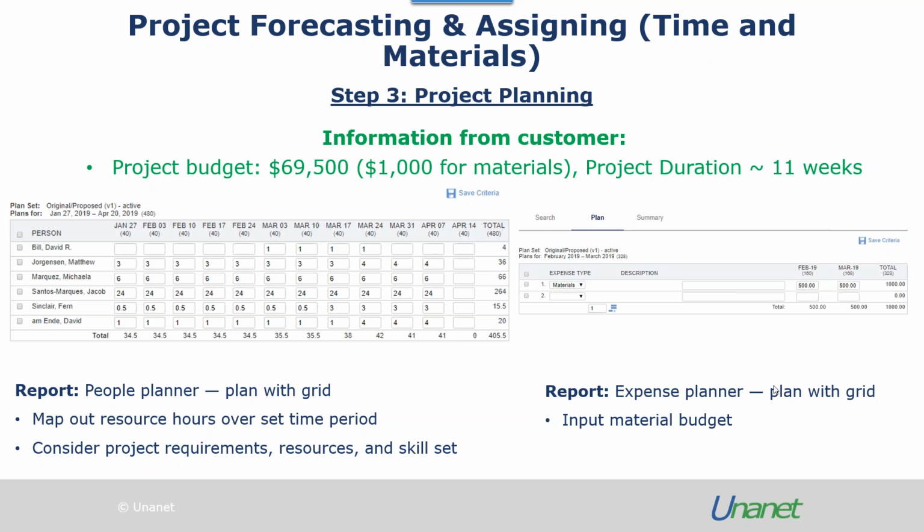So you can tailor the duration of the planning time period to meet the project needs. So for this particular project, as it's only 11 weeks, I want to plan it on a weekly basis. But for longer projects, you may want to consider planning on a monthly basis.